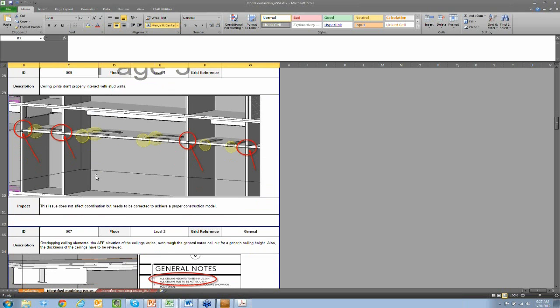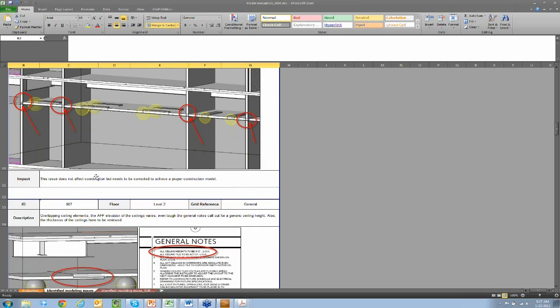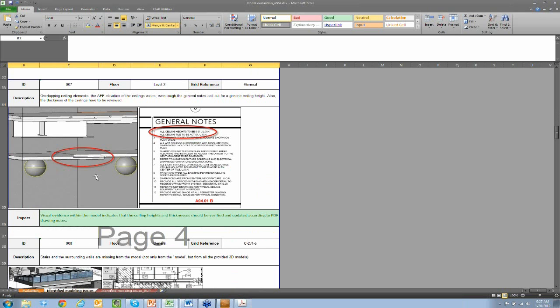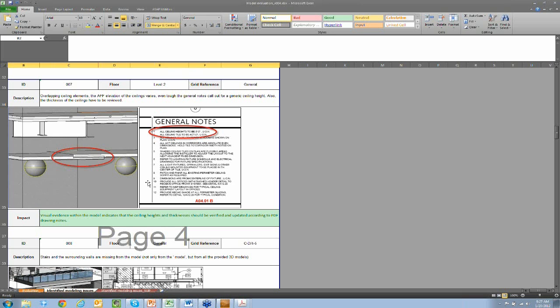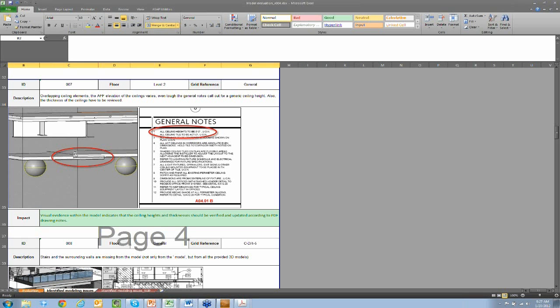We check everything when we do these model analysis. We check everything against the 2D drawings, and this is a good example of that output. The reason we do that, even though we receive the BIM models, we understand that the installer doesn't get these BIM models. The installers are always working off of the printed documents. A lot of times they come in PDF format and then are printed out on paper and sent to the trailer. So rather than just going by the information that's in the model to perform the coordination, we check to make sure that the model complies with the 2D documents.